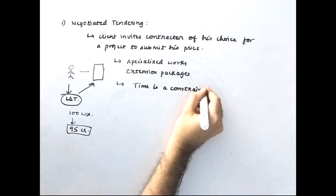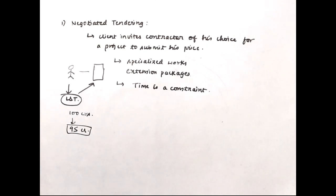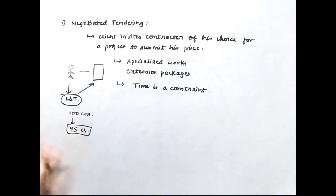This type of tendering is usually adopted when time is a constraint. The complete tendering process takes a lot of time — calling contractors, technical bidding, financial bidding, analyzing bids — it is very time-consuming. So if time is the constraint and cost is not a major concern, clients go for negotiated tendering. Usually only rich clients go for this because with only one contractor invited, there is no competition, and the contractor can quote higher rates.